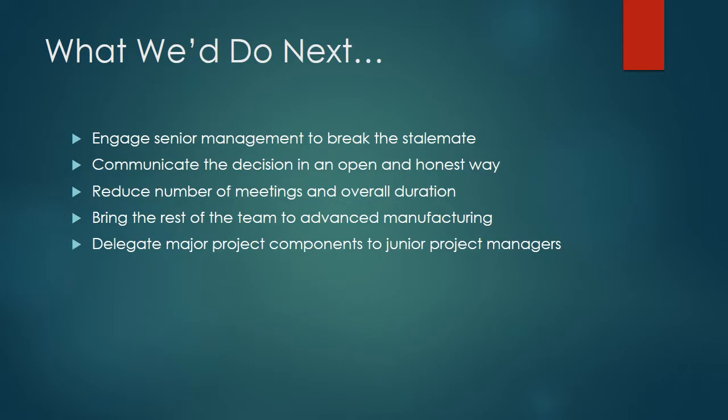What we do next: our case study left us at the point of Jack Smith being faced with this dilemma. What would we do next if we were the PM? We would create the senior management committee and engage them to break the stalemate. We would communicate the decision in an open and honest way, the same way Jack Smith had been running the project. Reduce the number of meetings and the overall duration as people have been commenting that it wastes time.